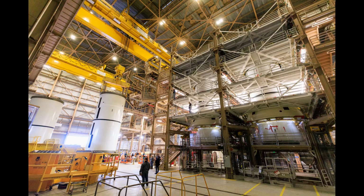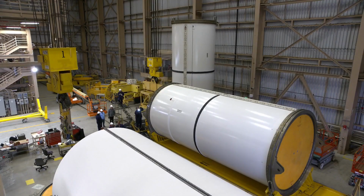As a whole, the SLS vehicle has been ready to stack since the first quarter of 2024. However, only the SRB hardware has been handed over to EGS. The rest of the SLS pieces still need to be transported to the launch site or officially handed over to EGS, or both. The SRB hardware was delivered to EGS at the end of the summer last year, when launch was still forecast for the end of this year, 2024.